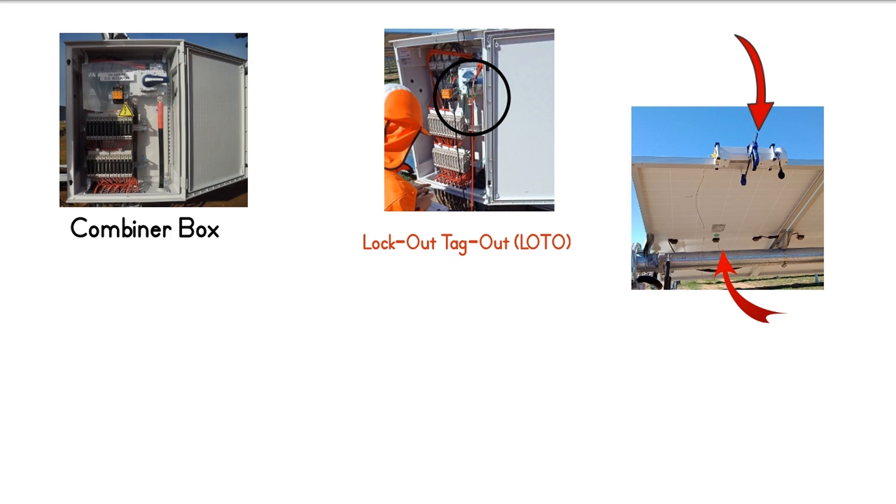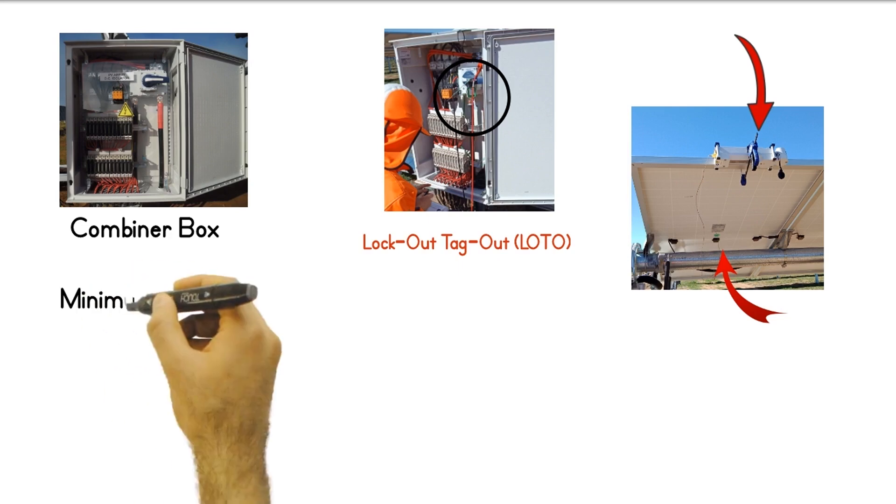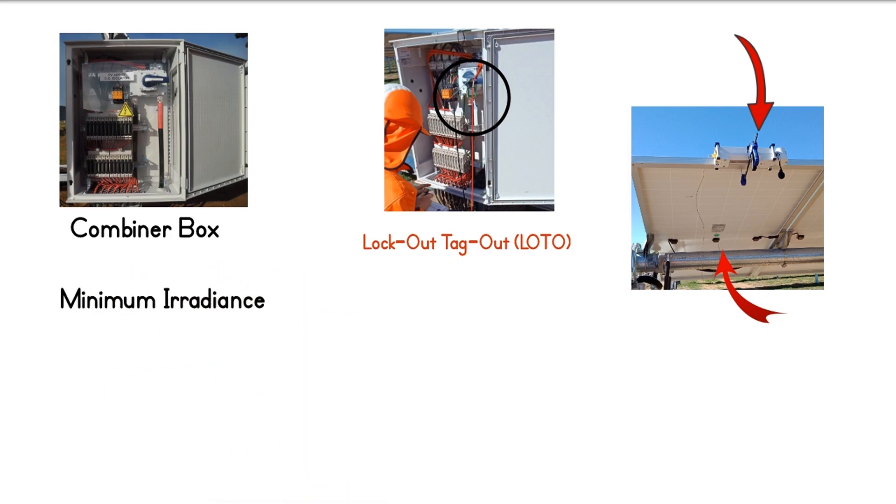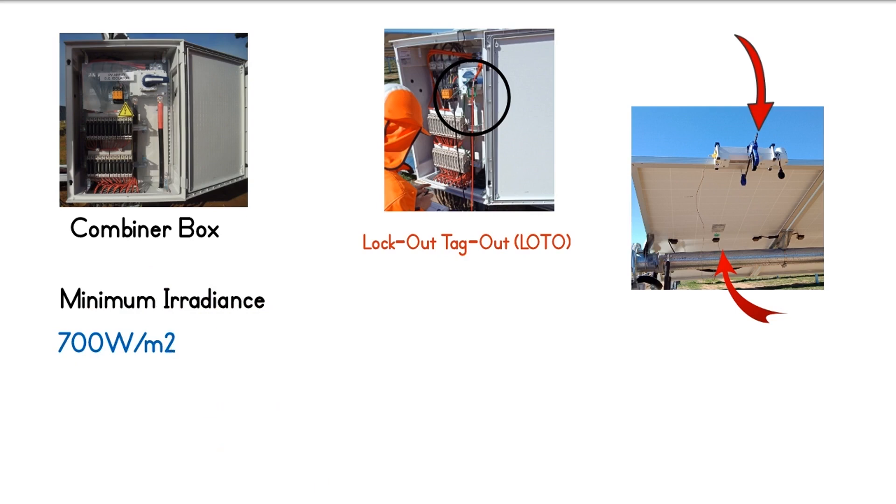Make sure that there is enough irradiance before performing tests. Required irradiance is typically above 700 watts per square meter. First, perform tests on each string by inserting the fuse to the string under test and pressing the test button on the tracer. Each test lasts for about 10 seconds but may vary. The test results are captured and saved electronically through the software.